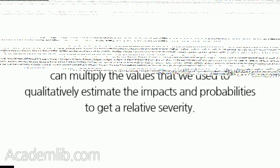Even if we are not using expected value analysis to evaluate the risks, we can still rank them. If we are using semi-quantitative techniques, we can multiply the values that we use to qualitatively estimate the impacts and probabilities to get a relative severity. This will be fine as long as the relative scale used for evaluating probability and impact is the same for all of the risks.